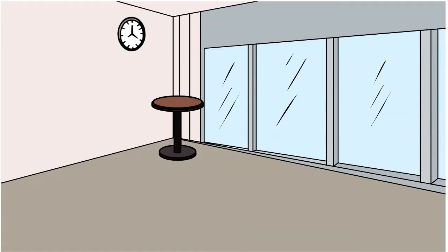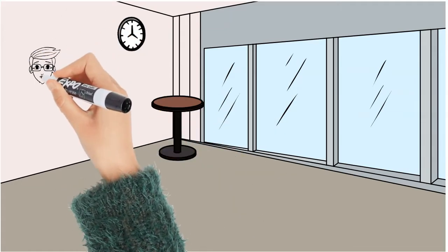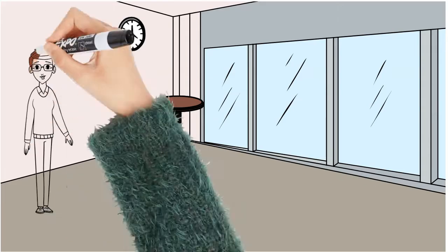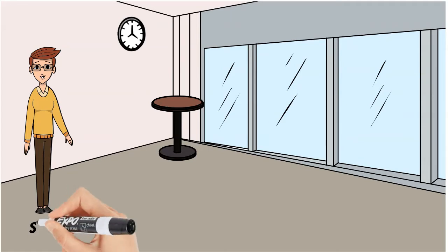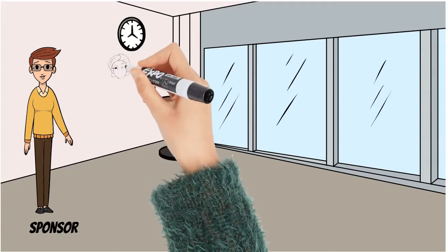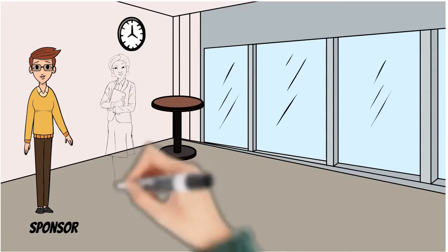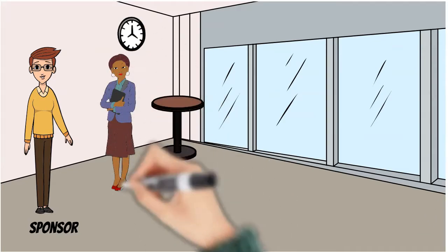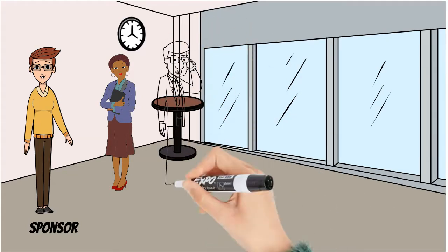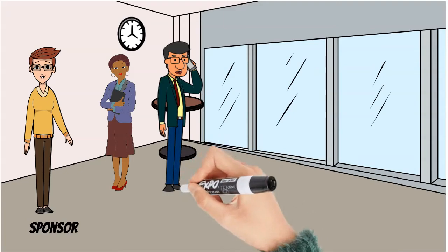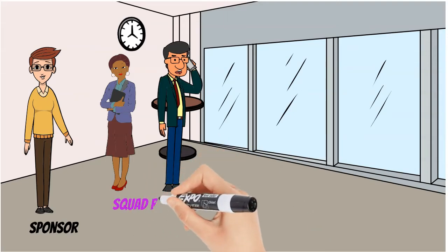The attendees of this workshop should be, firstly, the sponsor, who is the business owner who is driving the business goals, understands the priorities of the deliverable items, and holds budgetary control for the squad teams delivering this iteration. Next, we have the squad representatives. Typically, these would be the product owners and the Scrum Masters from each of the squads. Then we need the business SMEs and delivery specialists who can provide additional context for the backlog items and assist in some of the estimations.